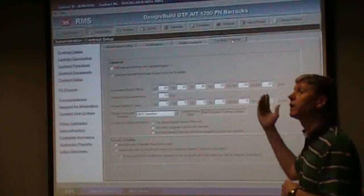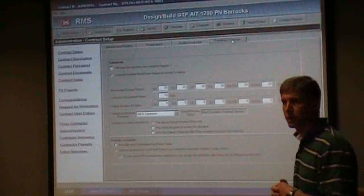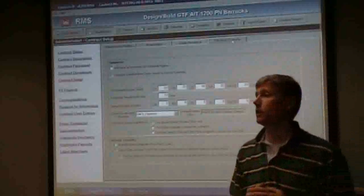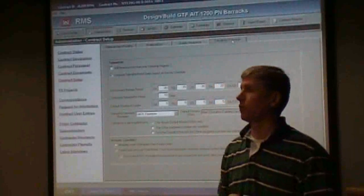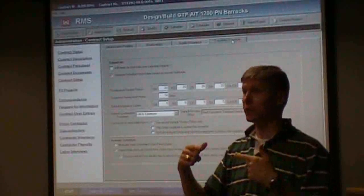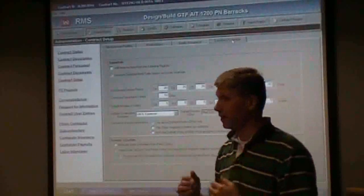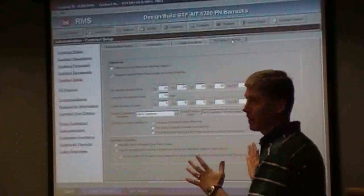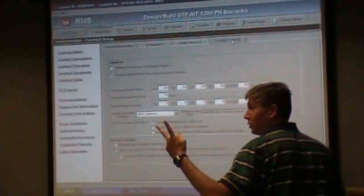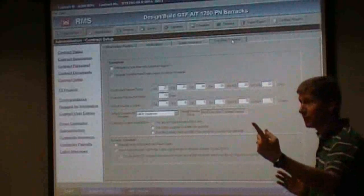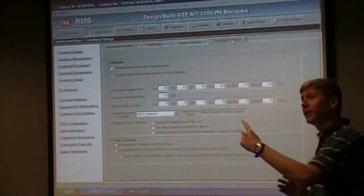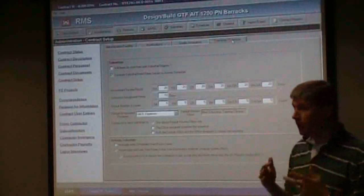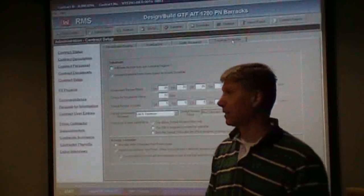So that's a great new feature because that's an obligation that they have to make sure the QC report matches the schedule. Now, it also gave them a feature where they can print the actual starts and finishes. And if they realize that the daily report's wrong, you've got to unlock it for them and send it back to them so they can fix it so then the daily report and the schedule match. Otherwise, there's no other out. That's your option. And actually, then you have to unlock two of them because you'll have to unlock the one that they said started so they can take it and say not started. And then the one that he truly started on. So it creates some burden, but now it makes them honest. Accountable. It makes them be honest on that.